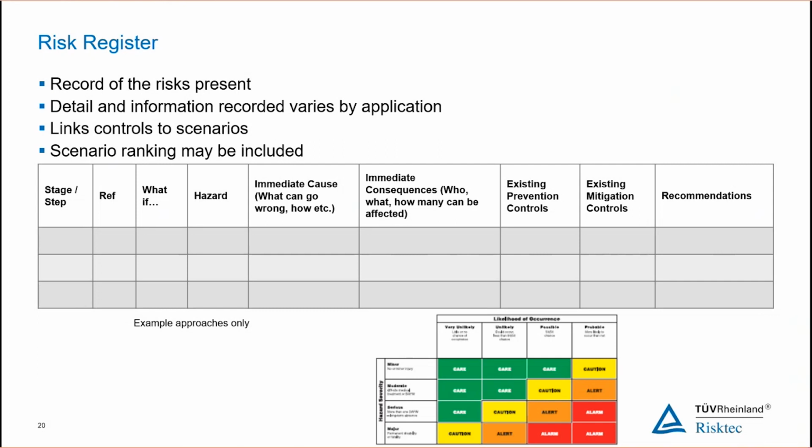It's important to recognise, though, that the risk assessment matrix is there to provide guidance to us. It's not making the decisions on our behalf, and it's important not to get hung up on the particular numbers and to spend an awful lot of time arguing about which box a particular risk exists in. It's there to give us an indication and to help us make a decision. It's not making the decisions for us.